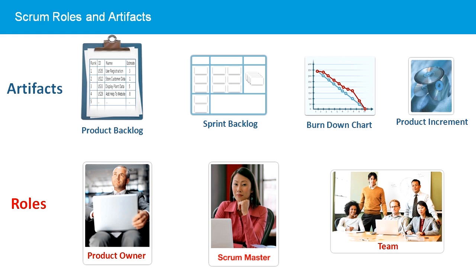The Scrum Master is responsible for ensuring the Scrum rules are followed. The Scrum Master facilitates the key Scrum meetings and also protects the team in the sprint, removing impediments and ensuring the team can focus on the work in the sprint backlog.